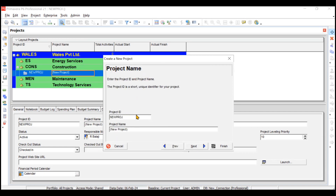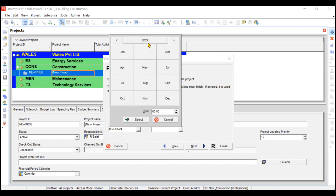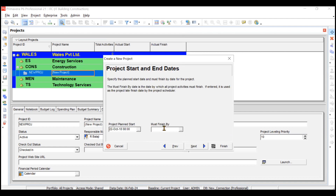Click Next. You have to choose the project name - give any ID. Since it's an IT construction project, I'll write ITC. The project name is IT Building Construction. Click Next. You have to tell the planned start date. The project is planned to start on 22nd October 2018. Select 2018, then October, then the 22nd which is a Monday. You can also change the hour - let's say the site starts at 8 in the morning. Click Select.